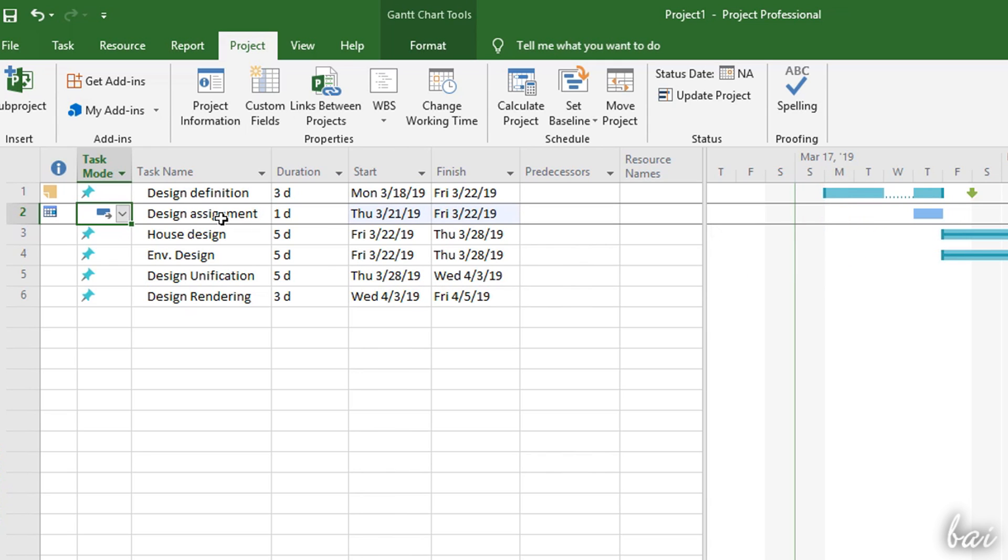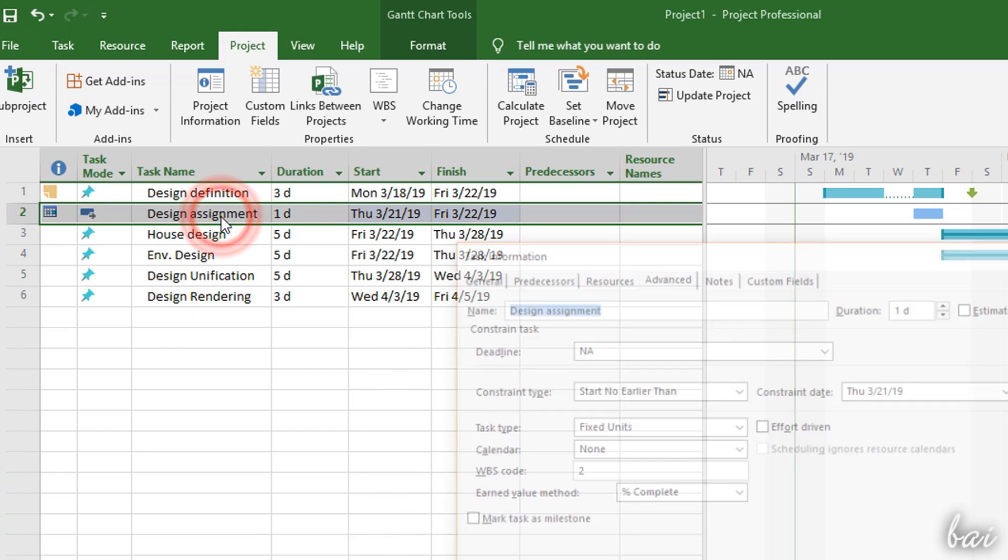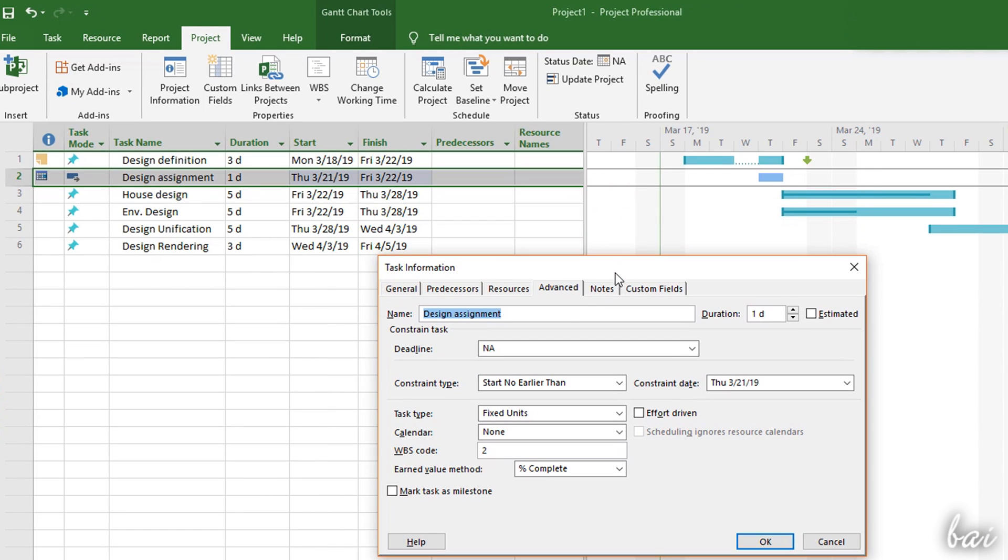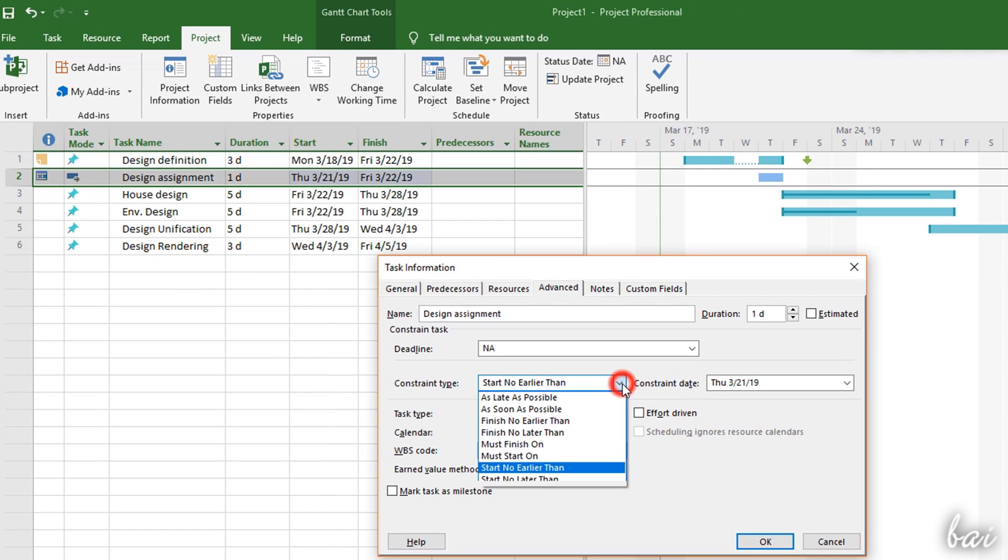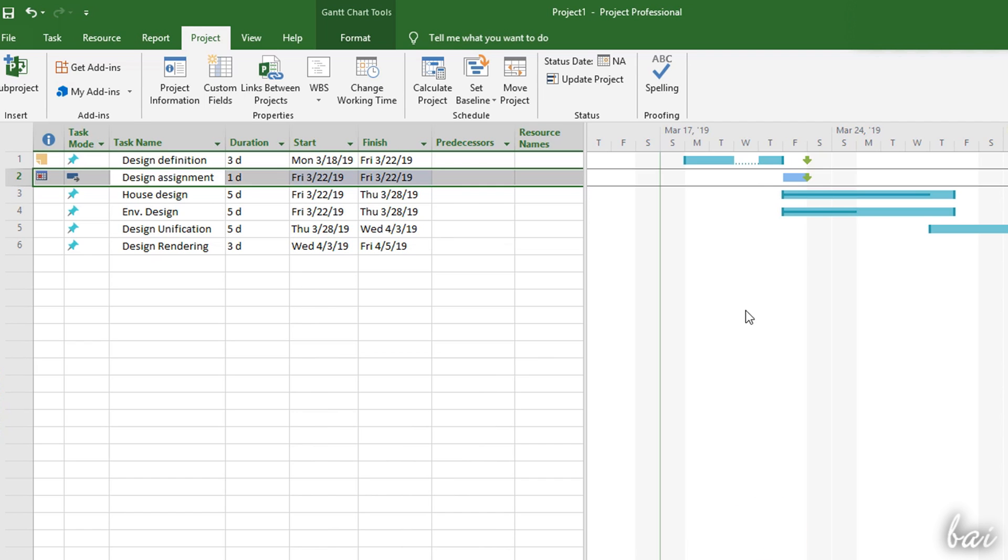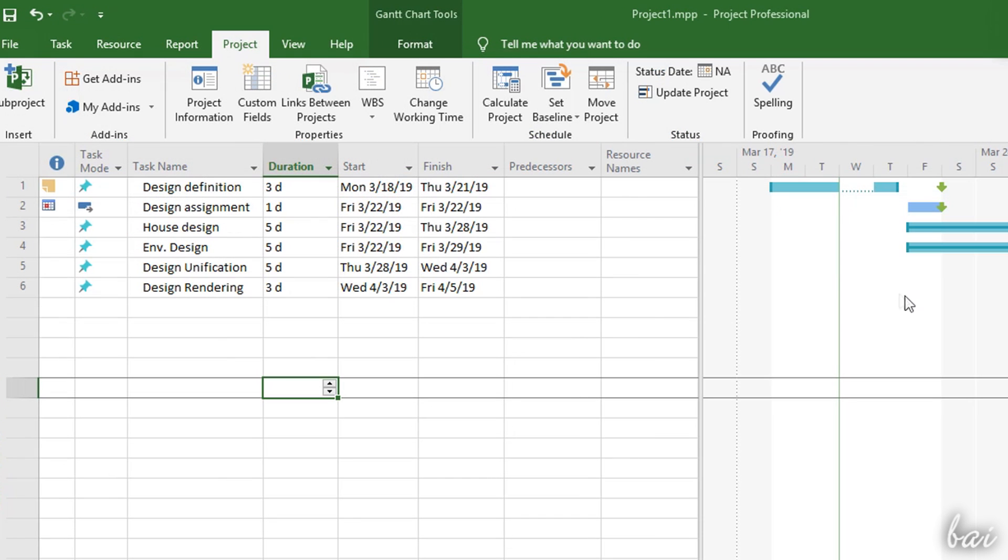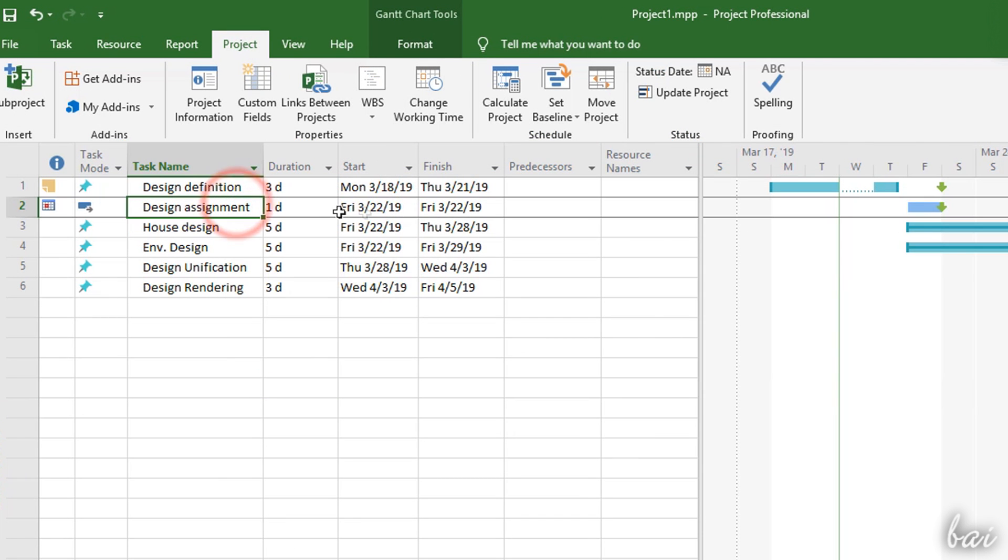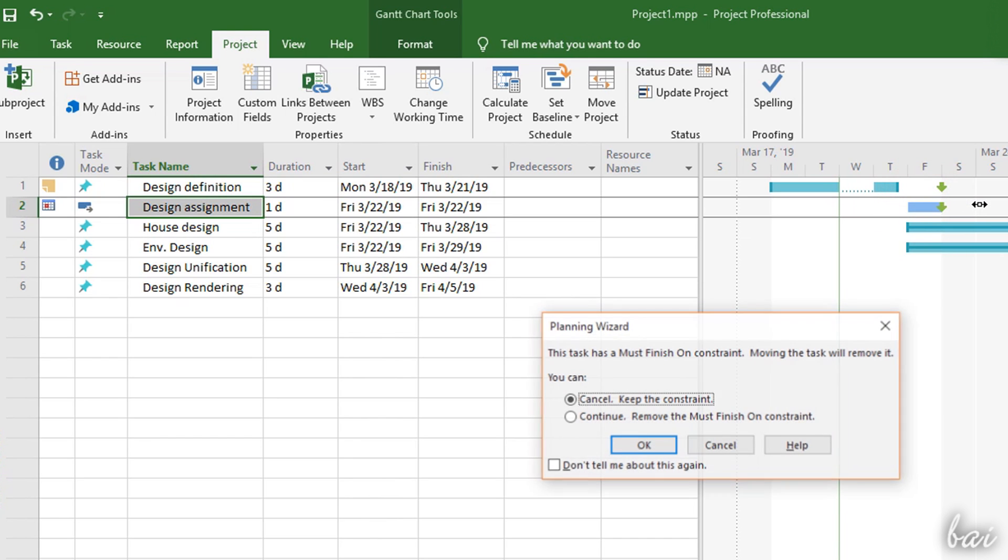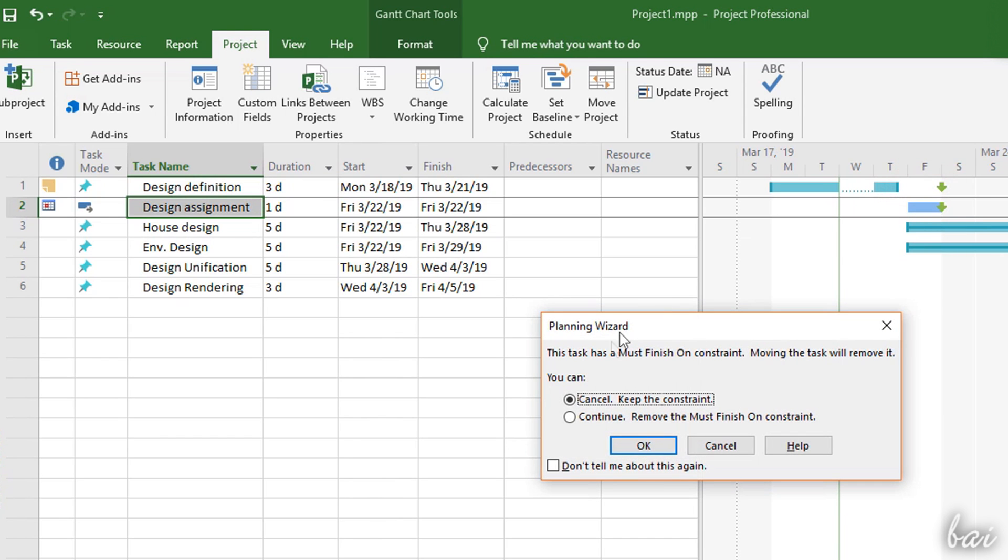From the Task Information panel, you can go to the Advanced tab to add any deadline and the constraints to be respected. Indeed, you can still move and edit auto-scheduled tasks manually, with the difference being that project assists you with suggestions to make your schedule effective, while respecting deadlines and constraints.